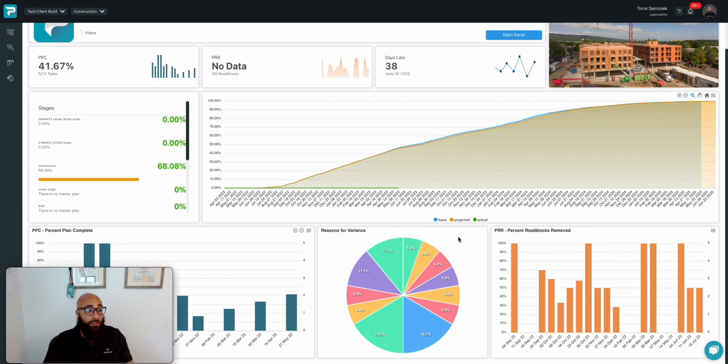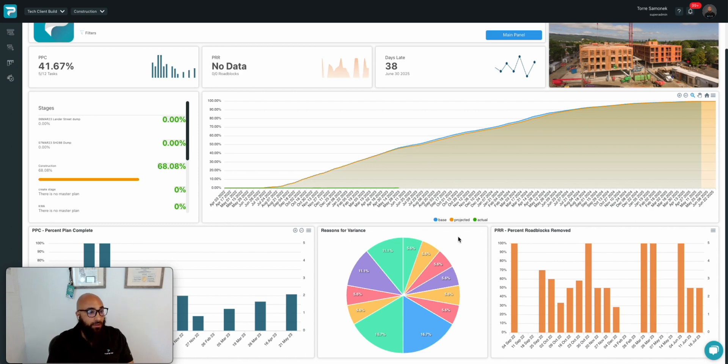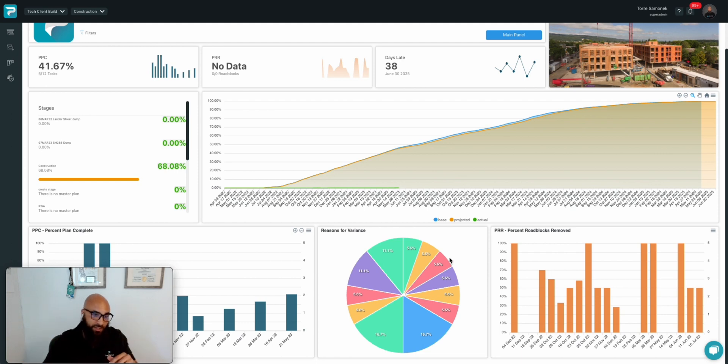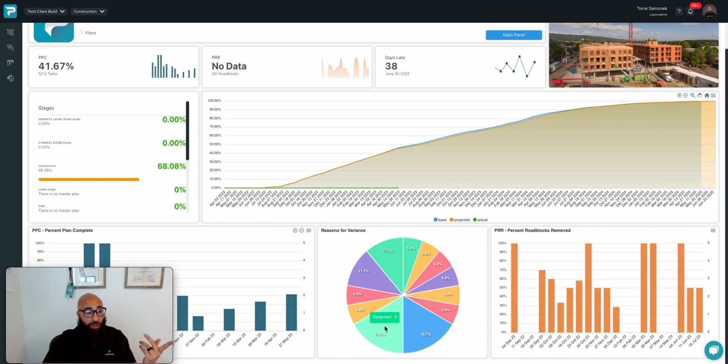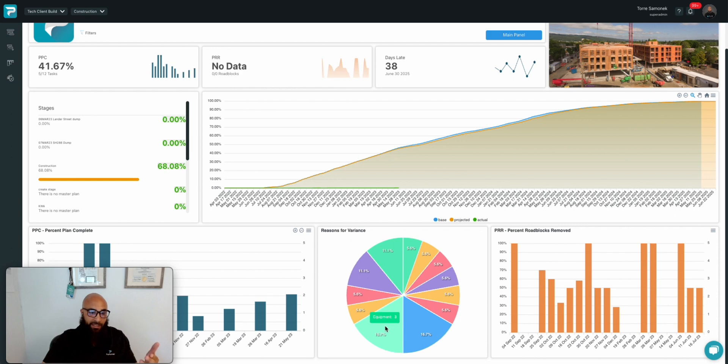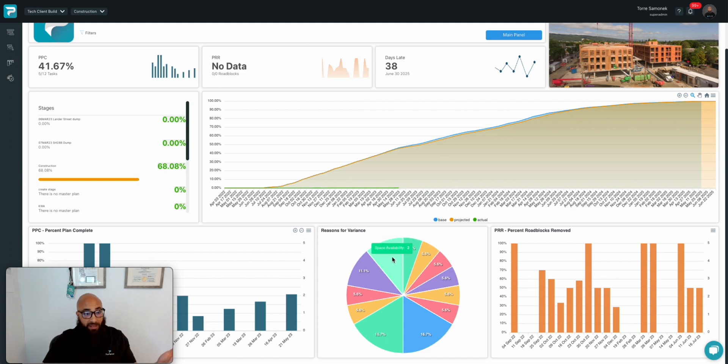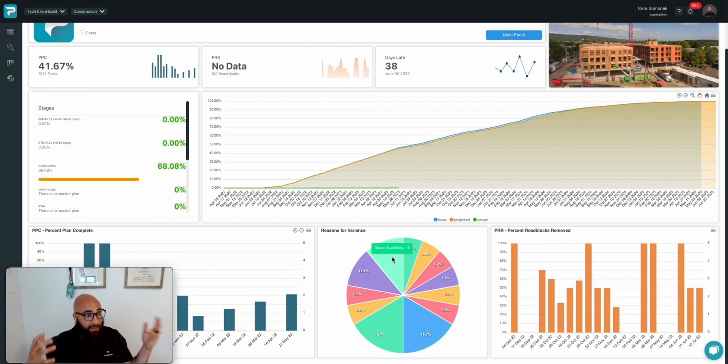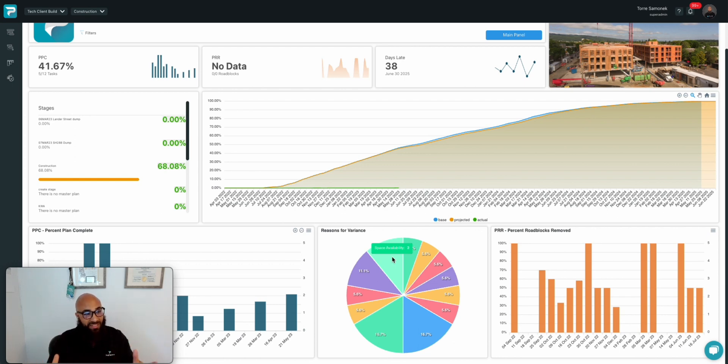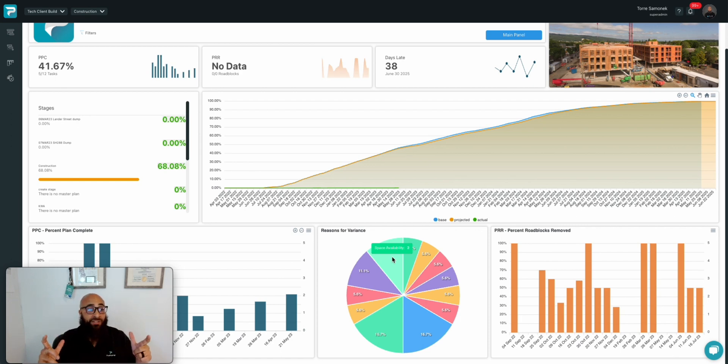One of the pieces of information that I like the most is looking at the reason for variance pie chart. Here, directly from the field's mouth and from the supervising team of the GC, we can get a good understanding of what our problems were based on a percentage basis. We could see 16% of the time we encountered issues with our equipment that stalled and prevented us from completing a task and activity on time. Drawings 16% of the time prevented us from completing a task on time. And 11% was space availability, trade stacking, getting material in there and making sure we can get equipment in there. We're going to be able to take that information, analyze it, and then make better decisions moving forward.